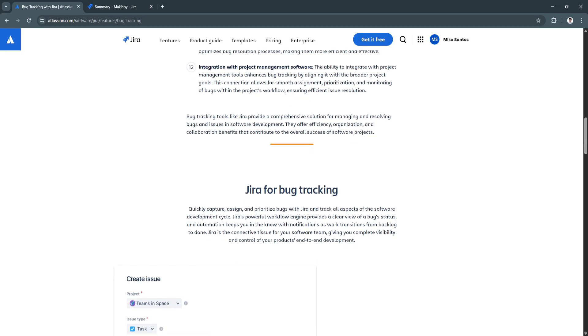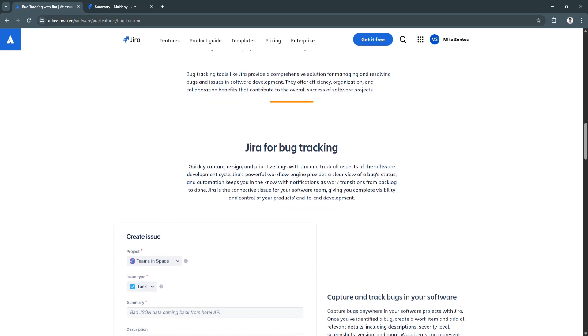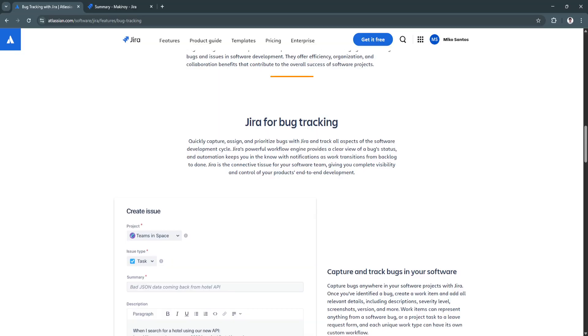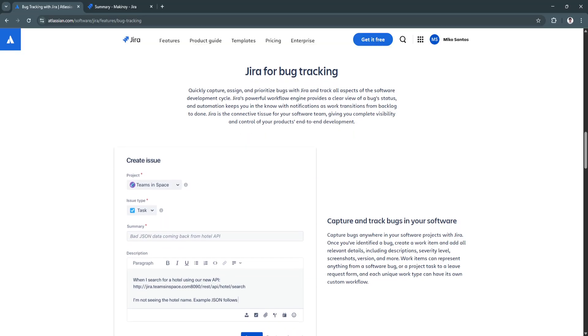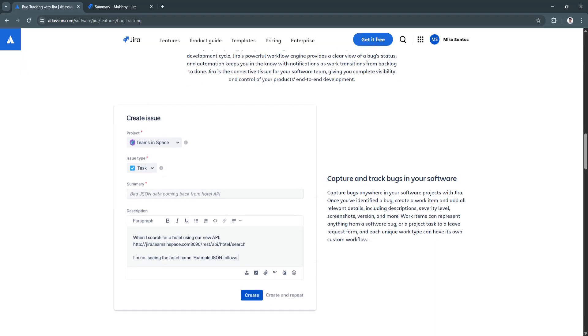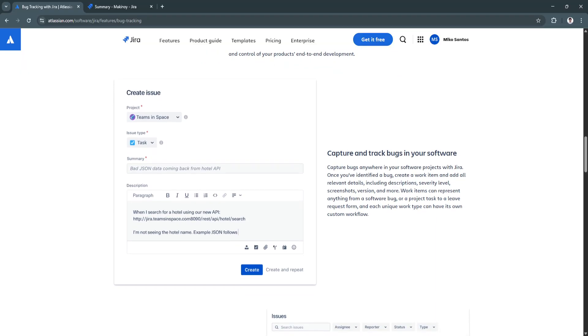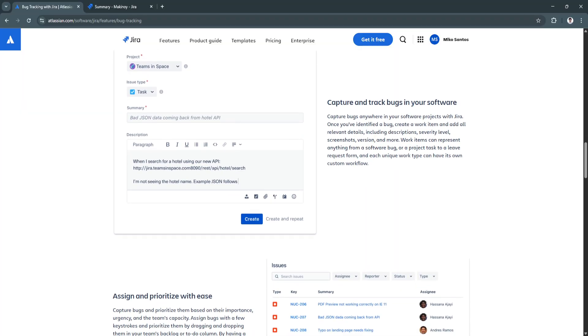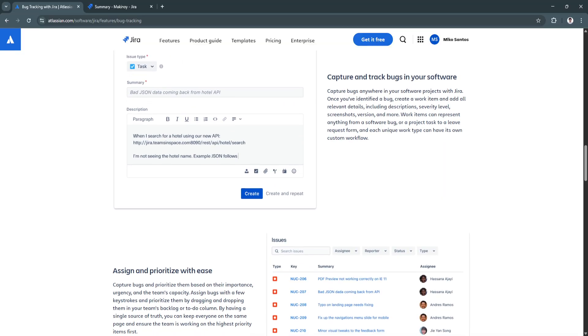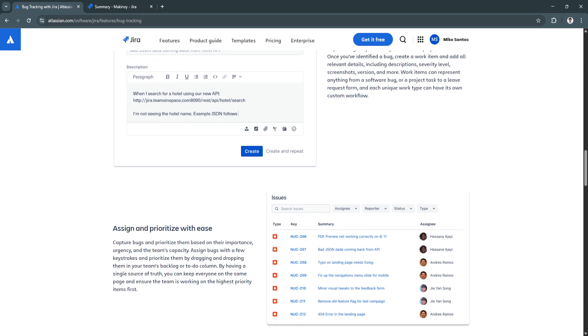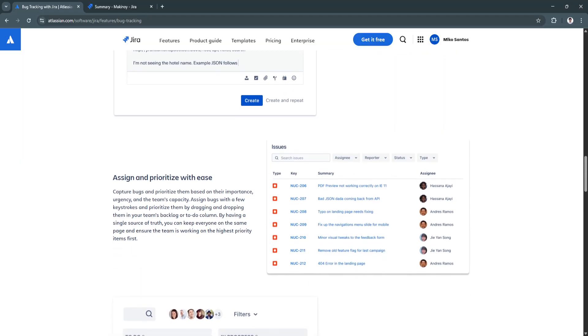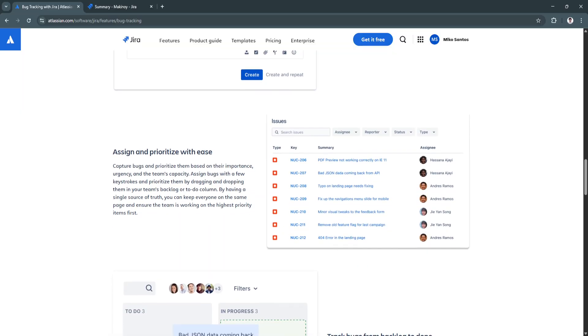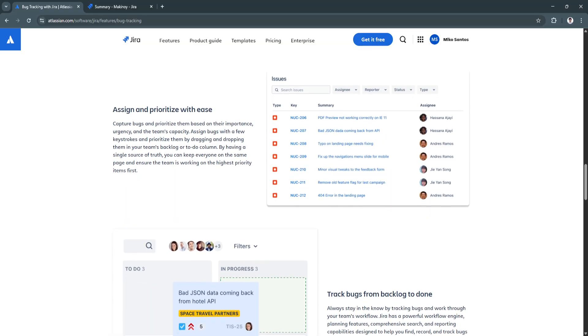Jira supports customizable workflows, which means teams can tailor how they handle bugs to fit their own internal processes. For example, one team might require a QA review step before closing a bug, while another might route bugs directly to developers for immediate triage. For teams working across time zones or with multiple roles involved in the software lifecycle, Jira becomes a central hub. Everyone from testers to engineers to managers can collaborate in one place, with visibility into what needs fixing and where it stands in the process.